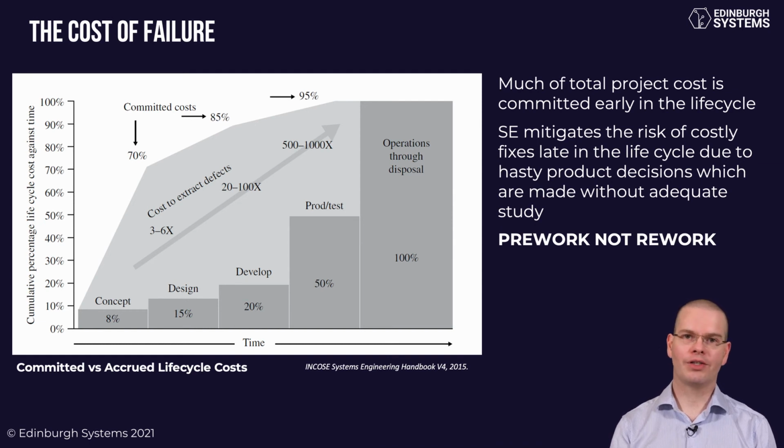And looking at the various studies out there, they say somewhere between 15 and 20% of your project's time and your project's cost should be spent in those upfront concept stages, doing that systems engineering and making sure you get things right. And that's what we call pre-work, not rework. So it's doing that upfront pre-work to avoid the rework later on.